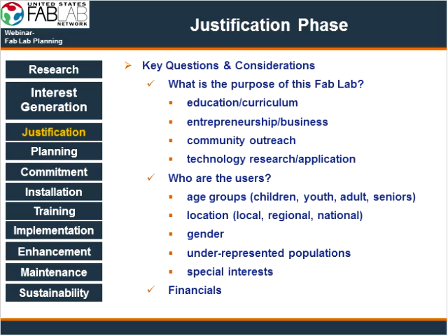As far as rules of thumb on your financial planning, in the Fab Lab kingdom you may hear recommendations that it costs $30,000 to $50,000. Those typically are much lower than our experience has shown. It also reflects the starter set of equipment. We think a better rule of thumb, especially when you start augmenting with existing equipment you might have, and depending whether it's community-based or in an academic setting, is that it usually runs more like $100,000 to get the starter set of equipment. You'll probably match that in people costs.